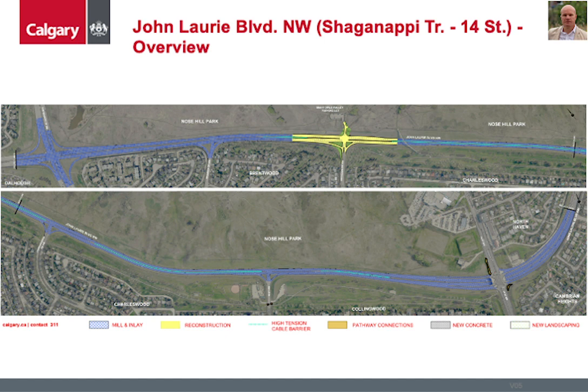There will be a few sections of pathway widening at 19th Street and 14th Street. Various concrete work and landscaping shown in grey and green respectively. Other work will include pre-installation of traffic signals underground infrastructure at three intersections: Brisewa Drive, Charleston Drive and 19th Street. The signals underground infrastructure is being installed as part of this project to reduce future costs and impacts to the traveling public. Signals will be installed when warranted in the future after a detailed analysis is completed.